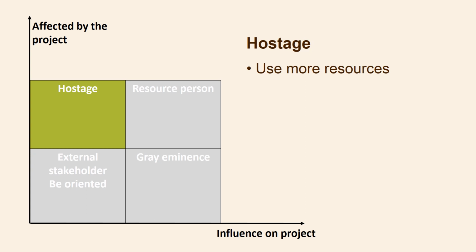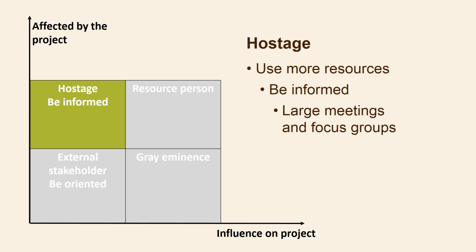Hostage is a group where the project manager must do more. Hostages have an interest in the project as they are affected by the project, but they have little or no influence. The project manager must inform the hostages. They must have the opportunity to ask questions. An example is the management of a hospital that adopts a new nutrition policy. It affects staff and patients, but they have no influence. The project manager could organise large meetings and focus groups among the hostages.